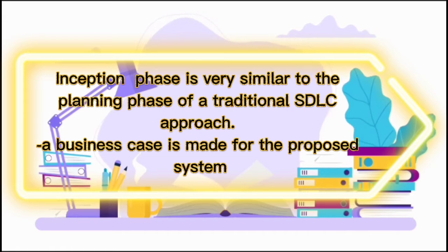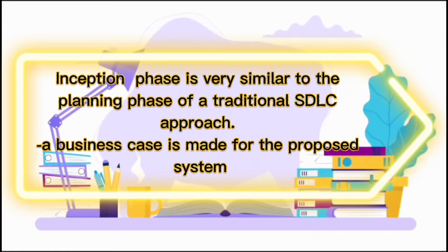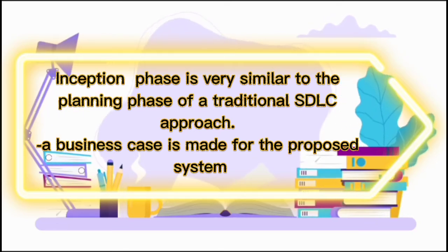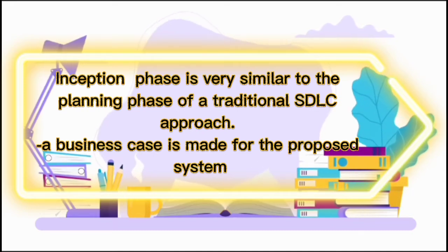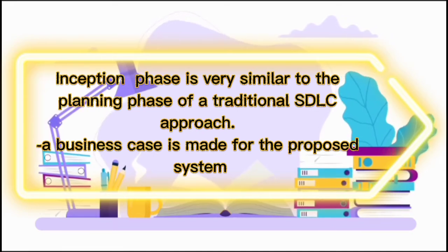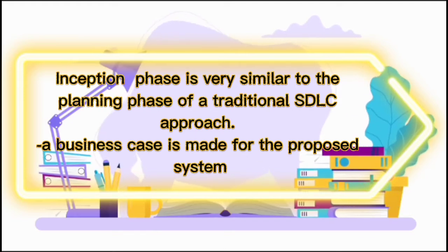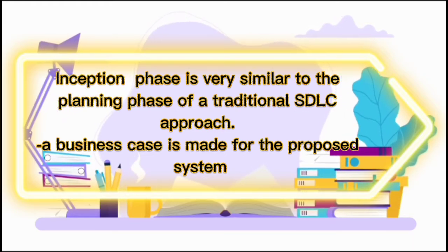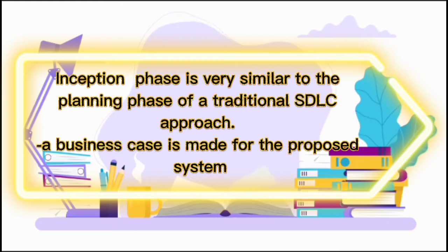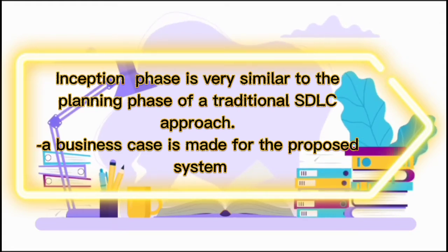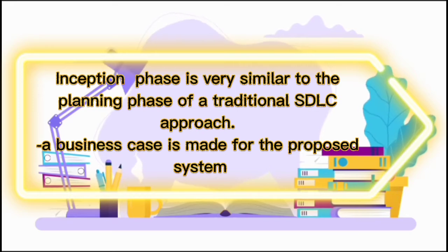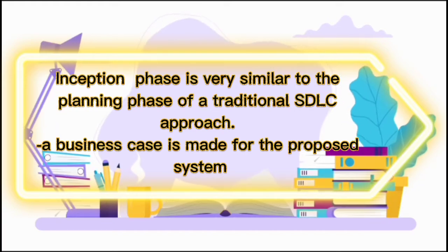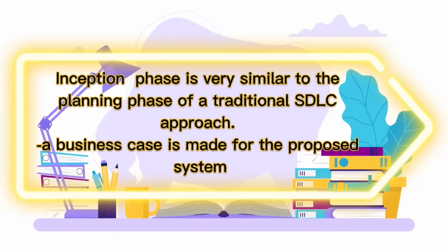The primary deliverables from the inception phase are a vision document that sets the scope of the project, identifies the primary requirements and constraints, sets up an initial project plan, and describes the feasibility and risks associated with the project. The adoption of the necessary environment to develop the system and some aspect of the problem domain class is being implemented and tested.